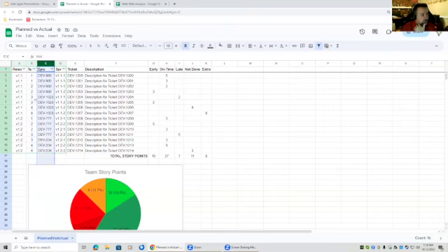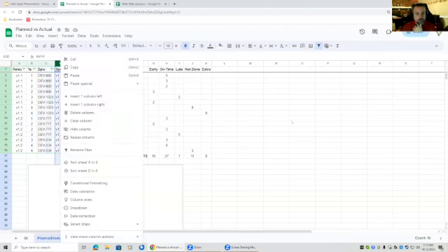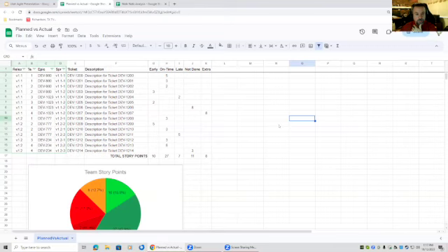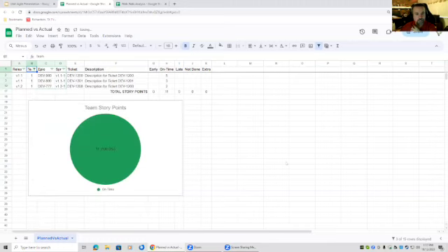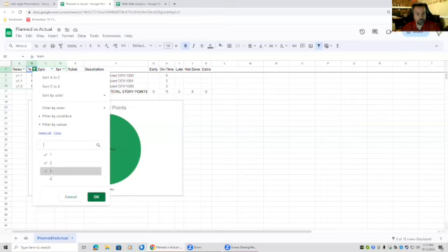This is your epics, could be your features, assuming you're doing one feature per epic. And this is actually your sprints. So what you can do is, if I'm talking to a particular team, like let's say team 1, and we're in a sprint retrospective, and we want to see how the team's been doing, I can filter this down and say, okay, for the most recent sprint, all 11 story points you delivered were on time. So good job, team. Y'all said you were going to do these 3 things, and you did these 3 things. High quality, right? I can also filter it by feature, regardless of sprint or regardless of Scrum team.